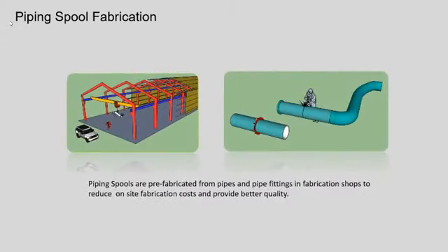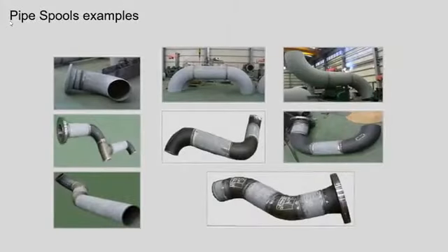Welding and fabrication. Pipe spool fabrication. Pipe spools are prefabricated from pipes and pipe fittings in fabrication shops to reduce on-site fabrication costs and provide better quality.